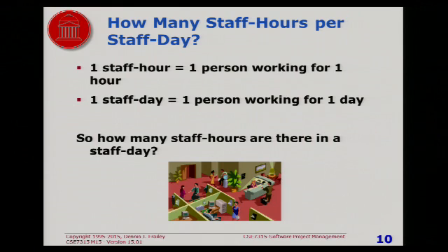For example, I once did some work for the New York Stock Exchange. They calculated that a person works for 6.5 hours a day. Why? Because the rest of the time they actually spend at work was spent doing things like taking breaks, walking between offices and not doing any useful work while you're walking between offices and things like that. That was their way of measuring.